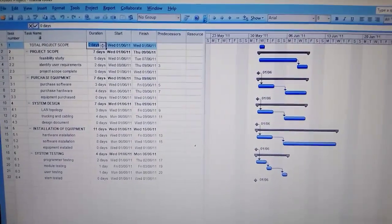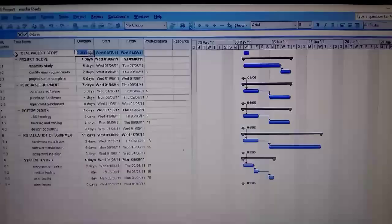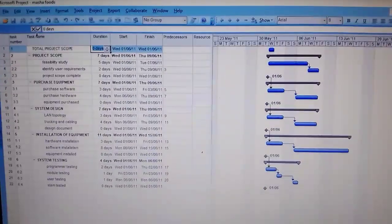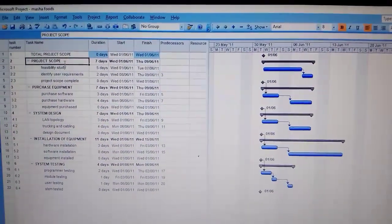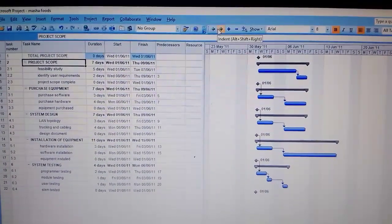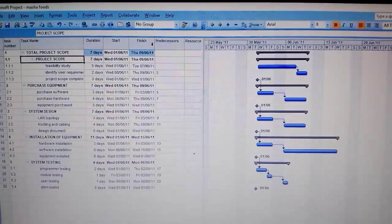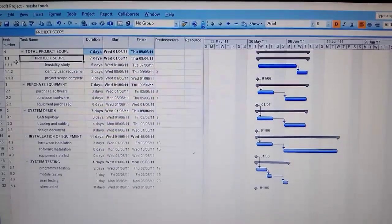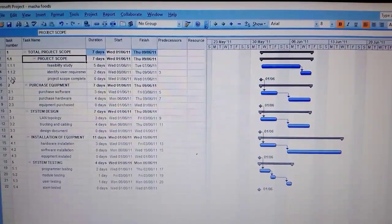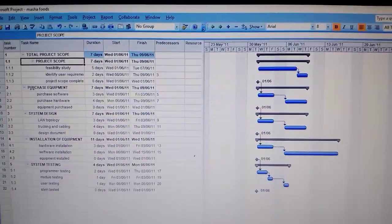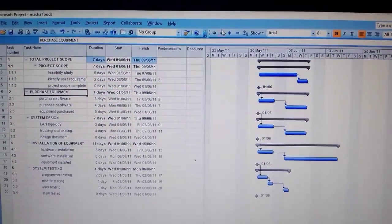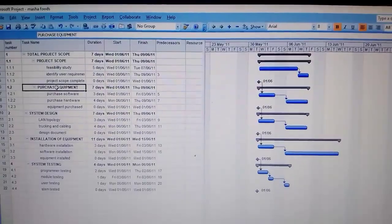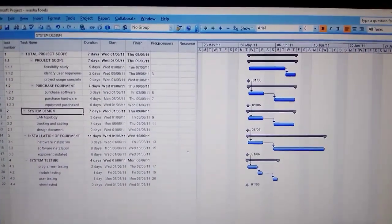So the total project scope, in order for us to determine the total duration of the project, we have to indent the subtopics, these ones that we did not indent last time. So you come here, you indent it, it becomes 1.1. It was 1, and once you indent this, even these ones change to 1.1.1 like that. So even here you come and indent the second sub-heading, it becomes 1.2 instead of 2.